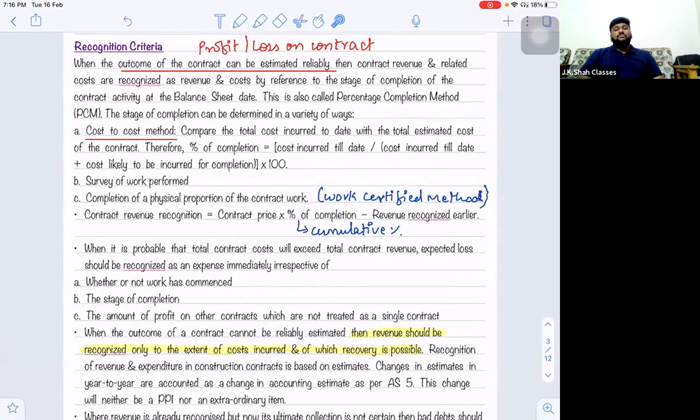See, I gave you an example of doing that electrical work. You can take any example, like whatever cost you have incurred that is outside the scope, so you are getting a reimbursement for it. If any cost that you are incurring is outside the scope of your contract, you are definitely going to charge a reimbursement for it. So you can put any example of your choice. There is no specific example for it. I gave you an example with respect to electrical fittings.